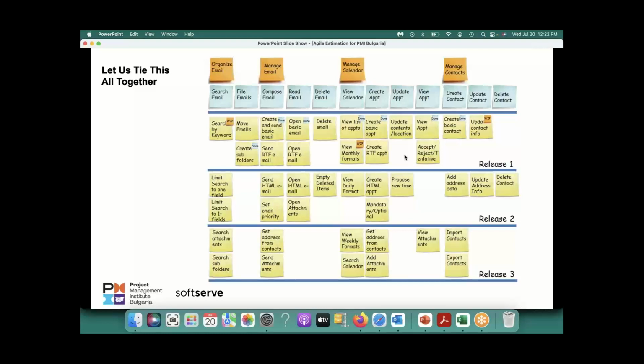And as I was telling, story points are not an absolute estimate. So there is a leeway there. There's a little slack there. So if I'm saying 1 story point, I will take the same example again, it means it could be anything up to 2. Now, there could be some stories that can be finished in half day. There could be some that could be finished in 2 days. There could be some in 1 day. And there may be some that may take 2.5 or 3 days, because you're not doing an absolute estimate, and your estimates have some uncertainty, but still it is a 1 story point. Okay.